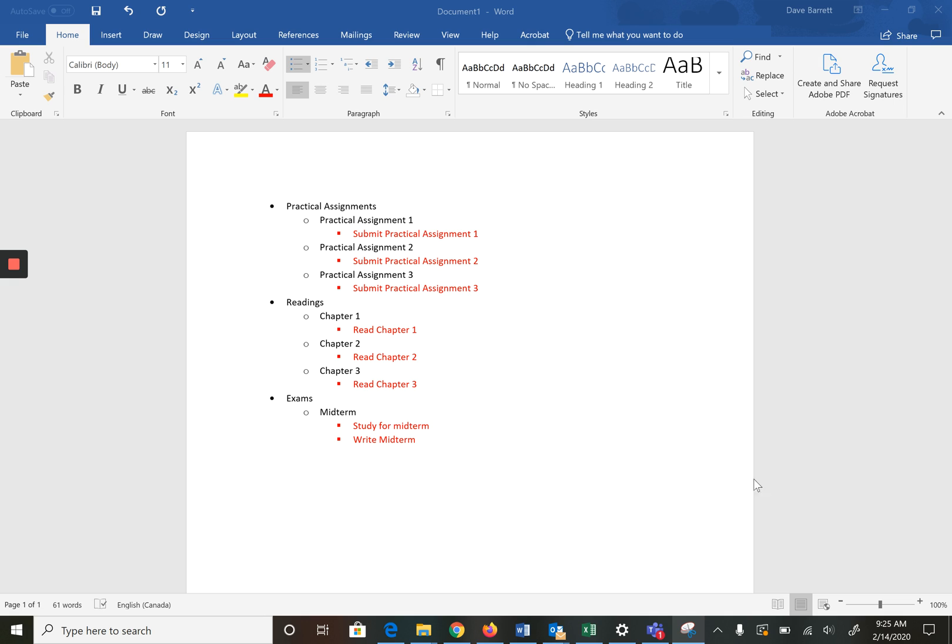Now in red is where I've started to define activities for each work package. I've taken a fairly simple approach of just having one for the practical assignments, one for chapter one and two for the midterm. Just for example purposes to keep things fairly simple.